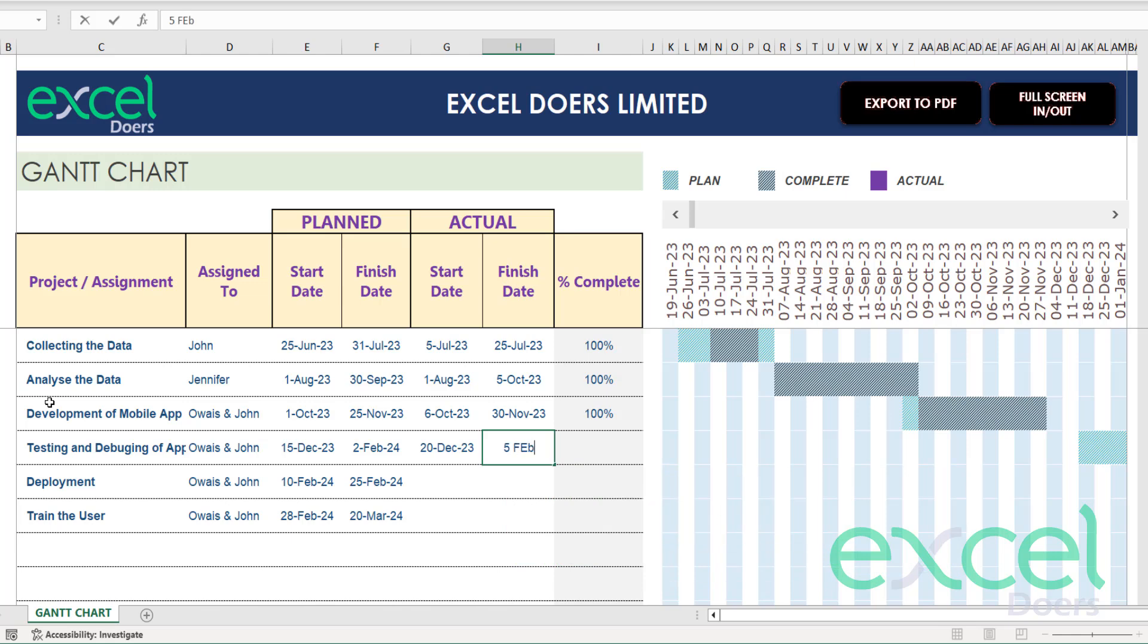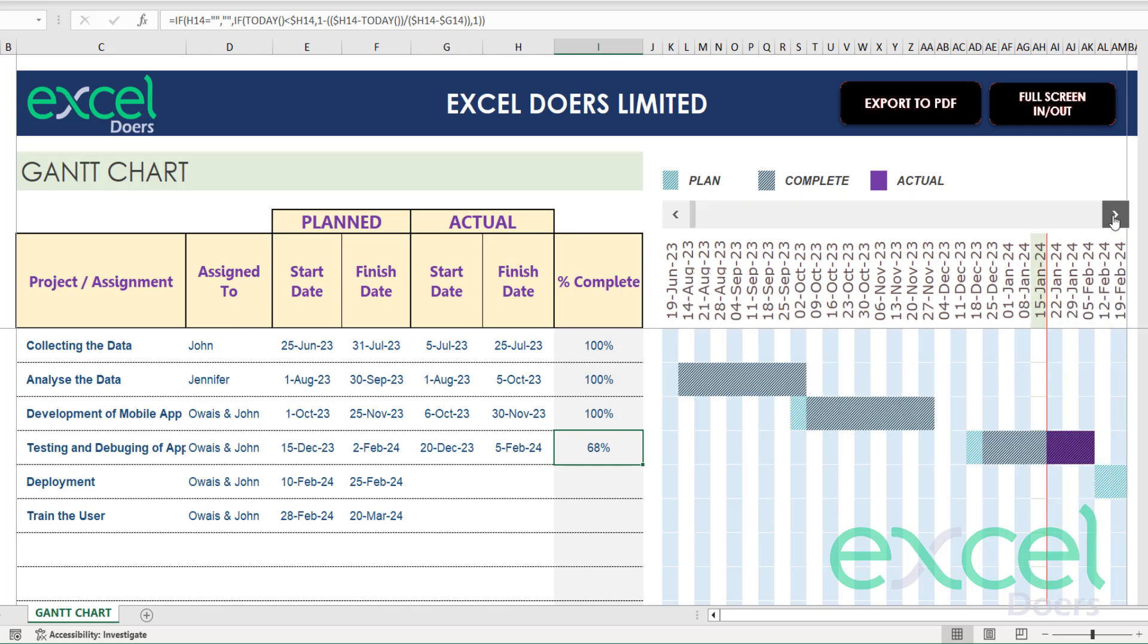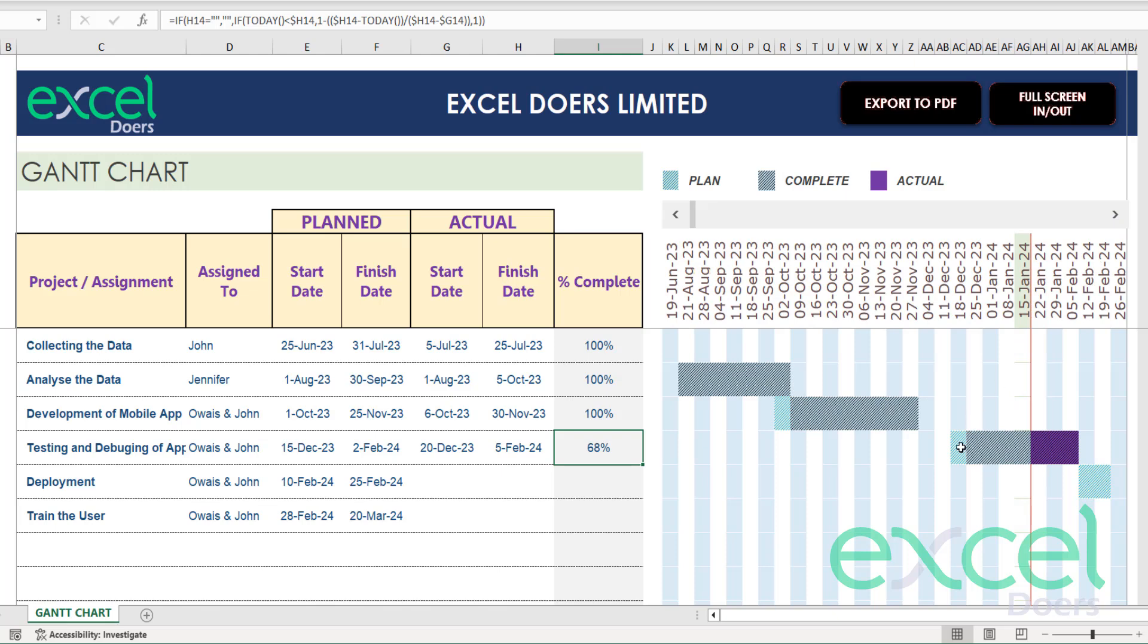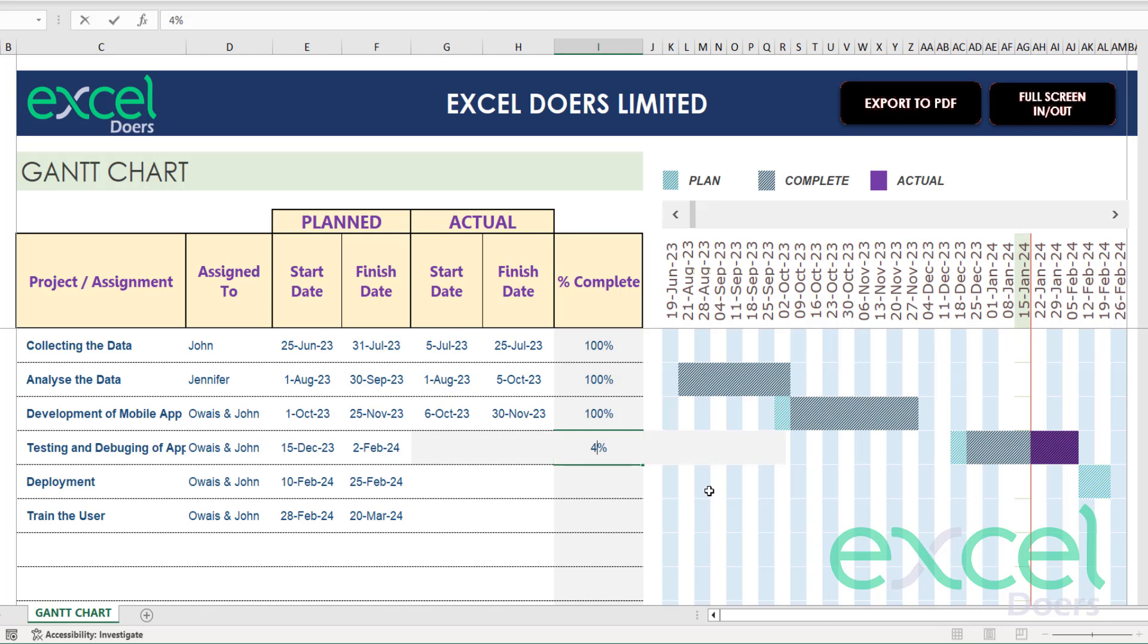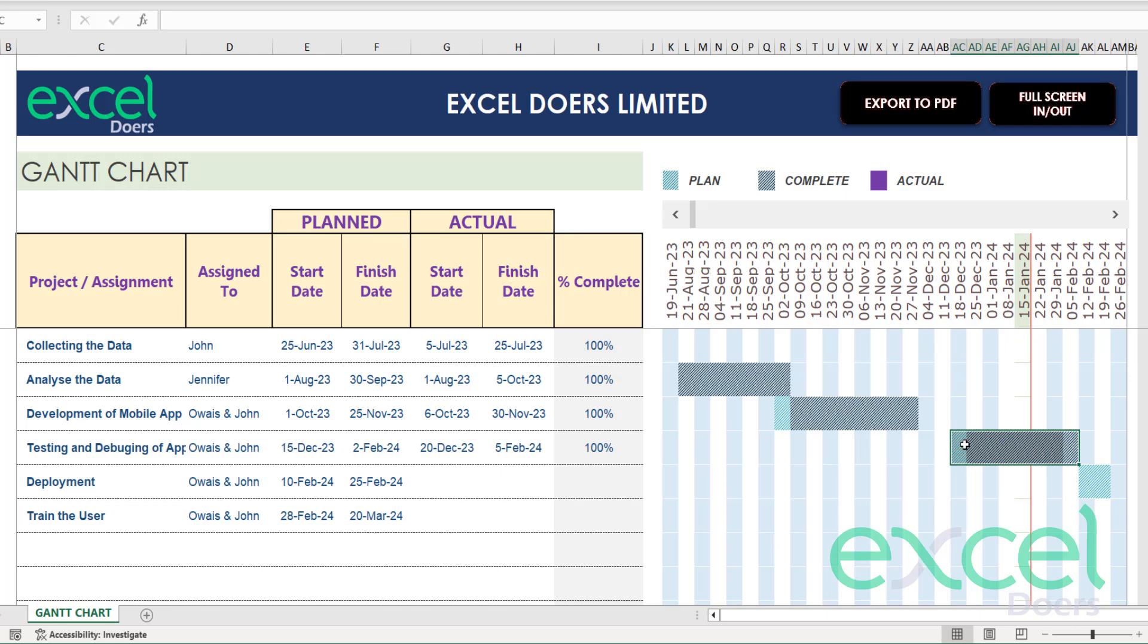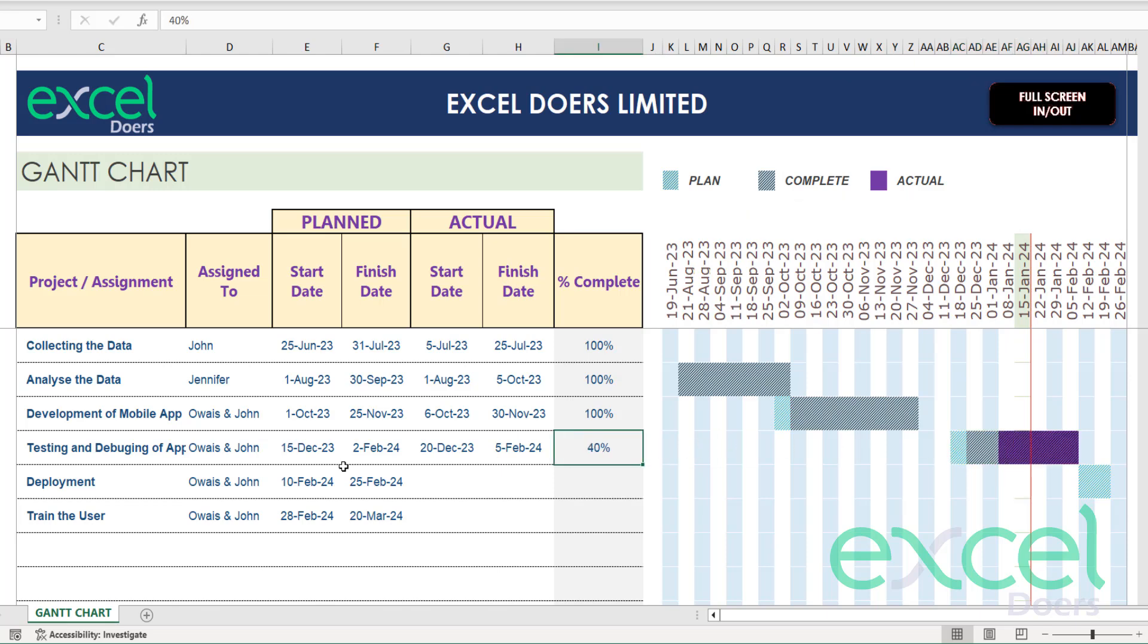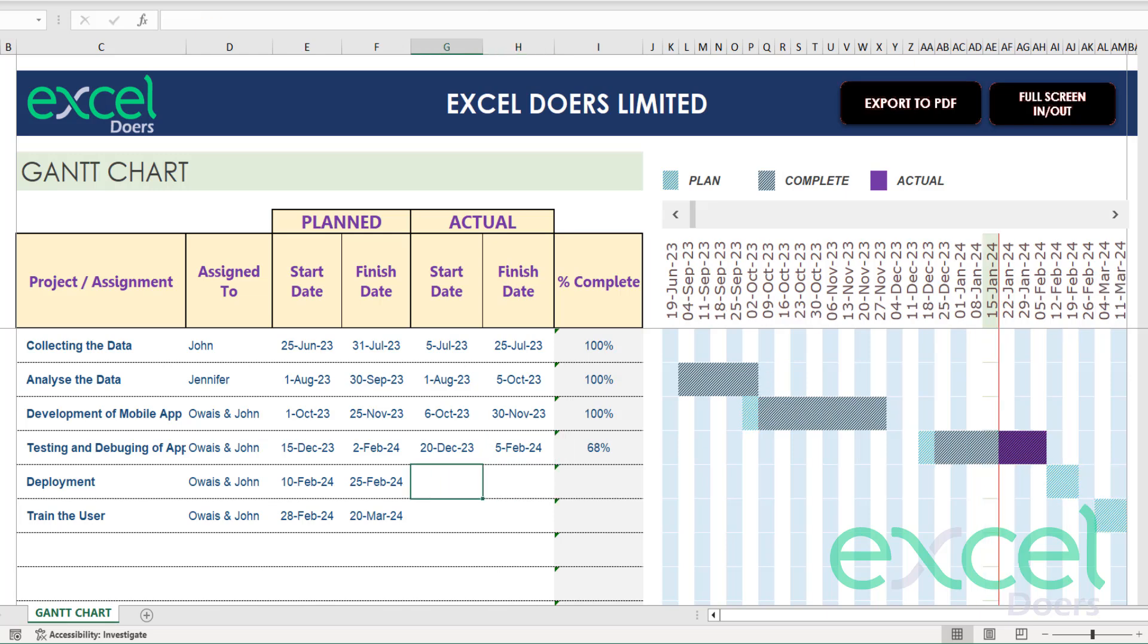Instead of 2nd February 24 I am now expecting my schedule to go to 25th February 24. You can see it's 68% because today is 21st January. It's planned to be started from here but it actually started here and we are done just this part and this part is remaining, that's why 68%. But you can manually adjust if you want to do 40%, 50%, or 100% will be all done. I just applied a formula here which I suggest you use.